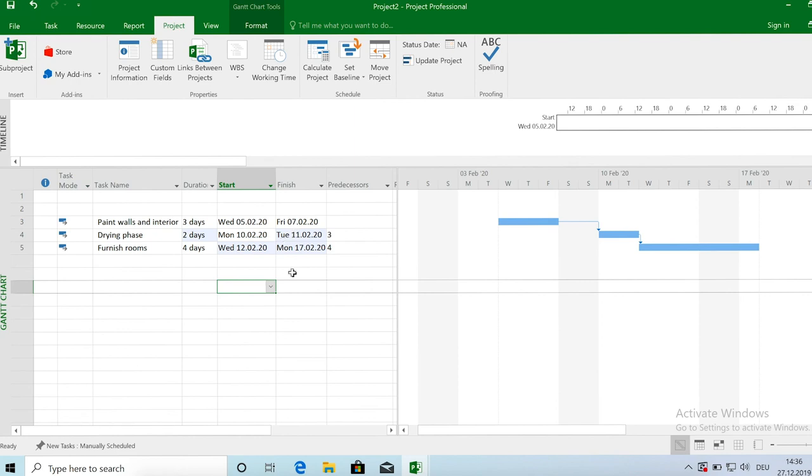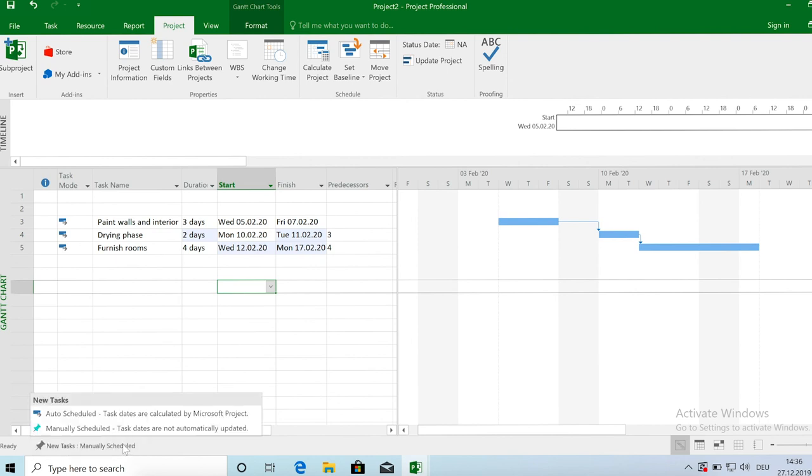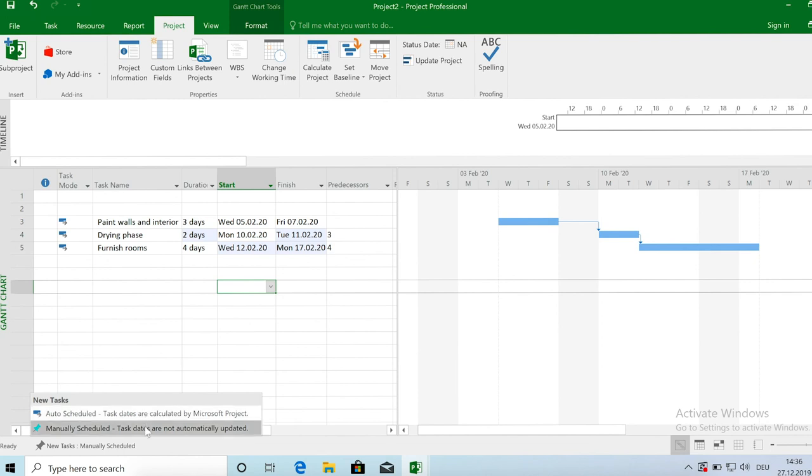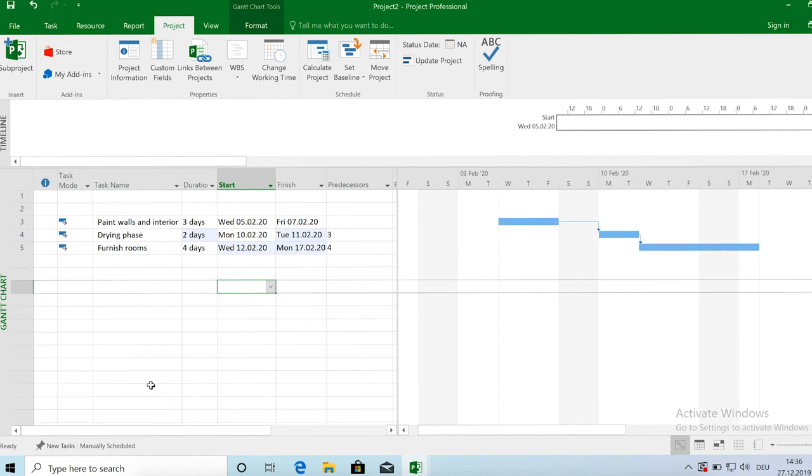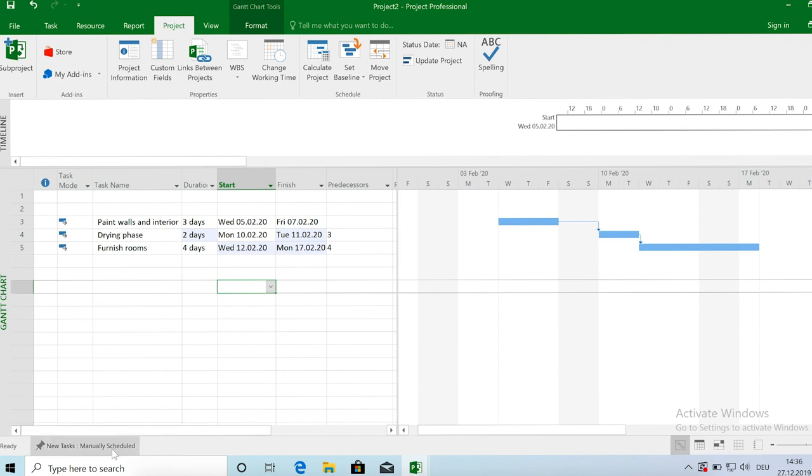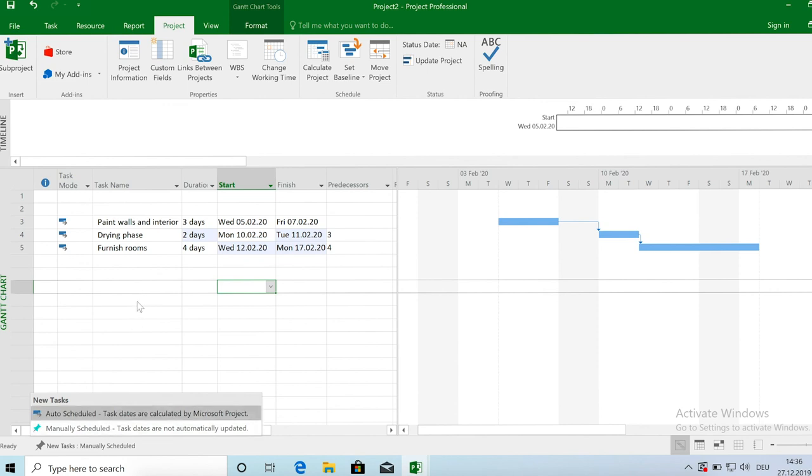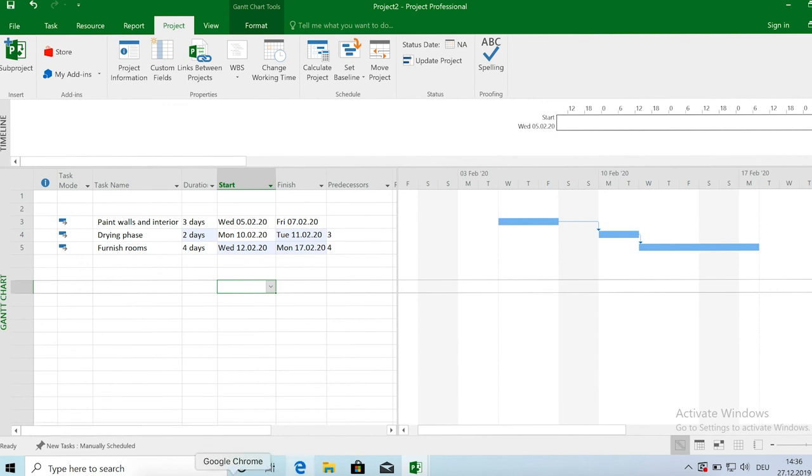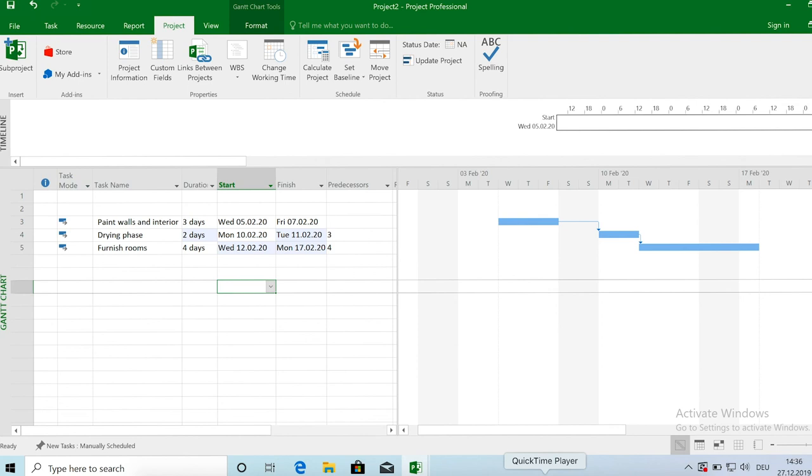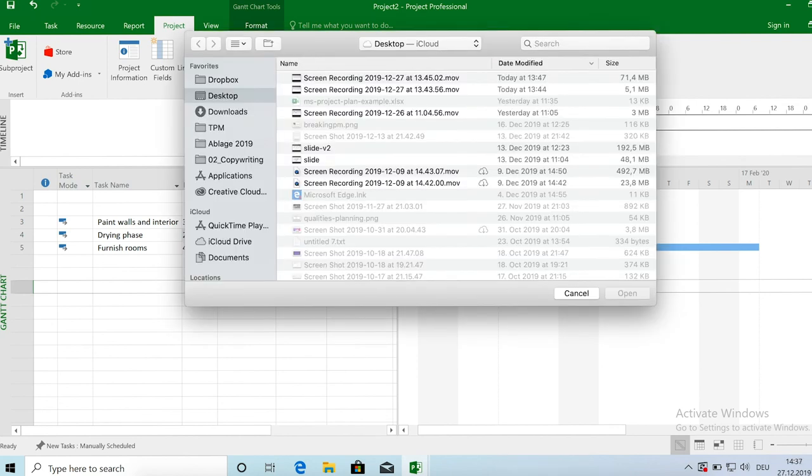So that's basically it. So you can also, one last note, you can also set or define in MS project which scheduling strategy you want to use for new tasks. So it can be set here at the bottom. And then for any new task that you create, it will automatically use the selected scheduling strategy. So I hope that was helpful. And if you have any questions or if you liked the video, just post a feedback. I would really appreciate it. Thanks so much and take care.